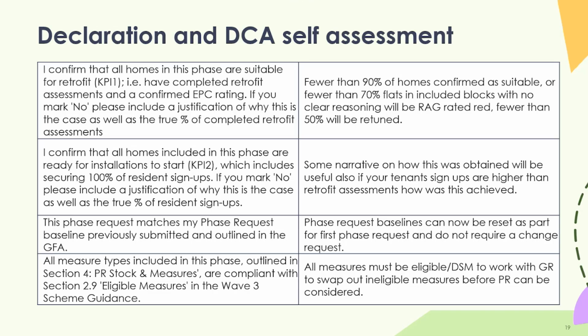So basically what we're going to be doing there is, obviously you can say yes, and hopefully you are submitting compliant ones. We'd also check the baseline measures that you submitted to make sure that those are PAS compliant. What we don't want to see in that baseline measures is, you've got an opportunity to add other measures, which is fine, but please don't include A&A costs or retrofit design costs. The department don't want to see that. This is more for them to understand the costs associated with the key measures. So PAS eligible measures, design costs, etc., don't need to be included in that area.